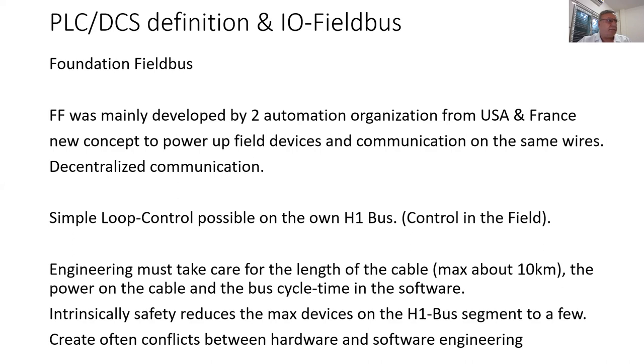I have done, I think, 4 or 5 projects with Foundation Fieldbus, and the commissioning, which means loop check, to test every single instrument, takes the same time to test. It does not really save anything. So don't really believe the seller, that is not true. That's my experience, and not only mine, everybody who has to do this can tell you about it.